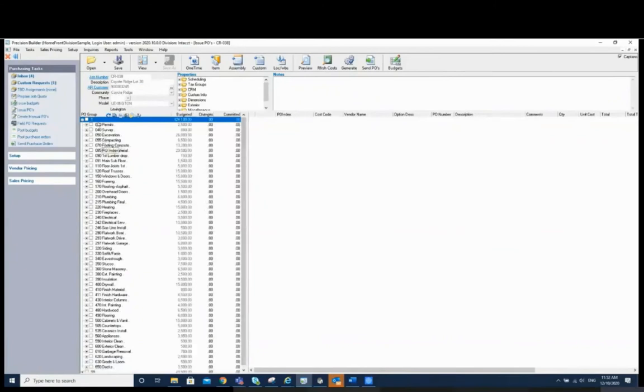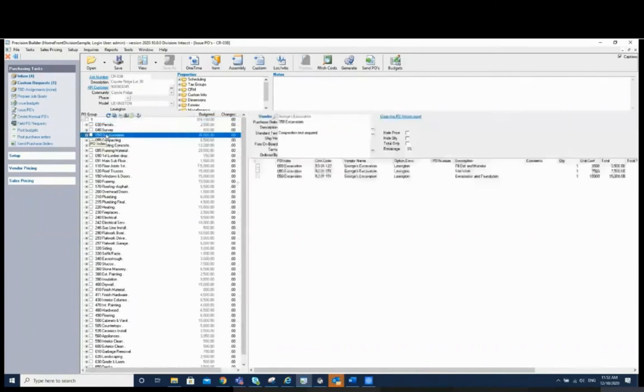And let's say, for example, by the time I've created my estimate and I'm getting ready to award the work, my preferred vendors are the ones that are being retrieved here. So you can establish a set of preferred vendors by neighborhood, by scope of work.